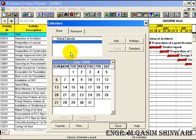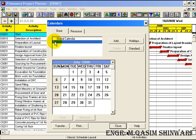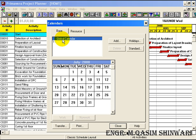Here you should know that we have a global calendar. Any changes we make in the global calendar will be reflected in all the calendars that we will make at any other time. It is a global calendar and other calendars are known as local calendars. So the global calendar has an effect on local calendars, but local calendars have no effect on the global calendar.